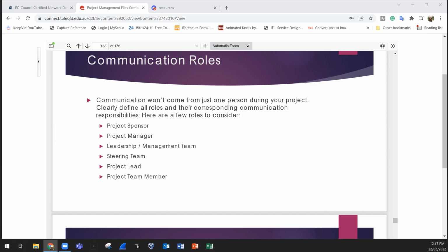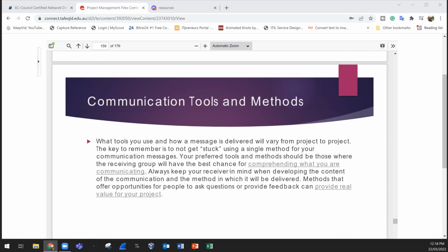Each team member will send me an email by the end of the day saying what tasks they finished, what is remaining, the percentage of finished tasks, and so forth. Then, as project manager, maybe I will report to the financial manager on a weekly basis through a face-to-face meeting. I have some details in a PowerPoint, then we conduct this workshop. So I'm communicating with a different method, and based on the information I'm getting from my team, I will update the financial manager.